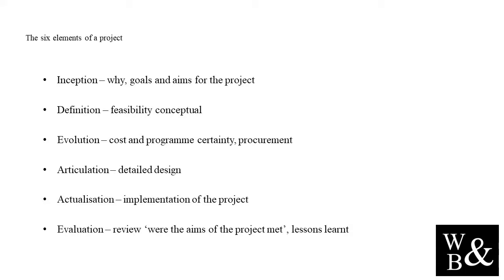In this element, we also need to set the project goals and aims. We need to set the metrics in which to measure success. For that, we need to understand the starting point, and this will help to pave a clear path to the end goal. In this element, you may also have an appreciation for the project budget based on previous projects. To complete this element and to move on to definition, we need to define why the project is needed and set clear, achievable goals and metrics in which to measure the success.